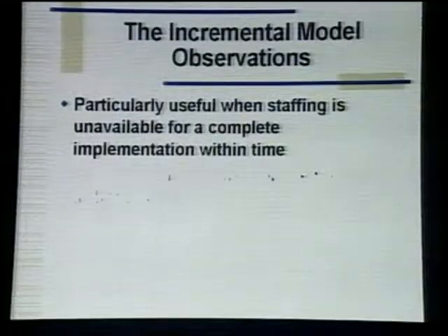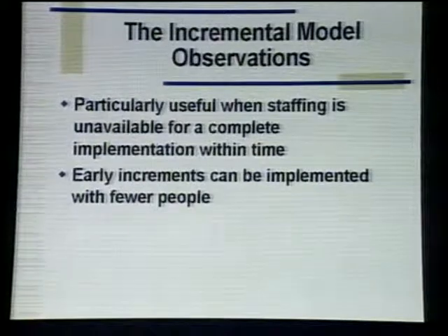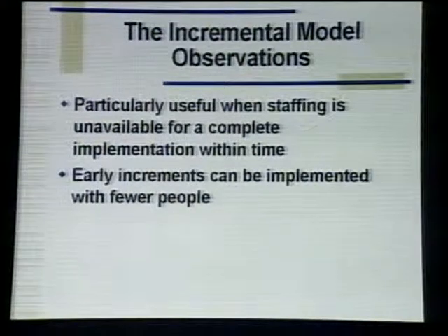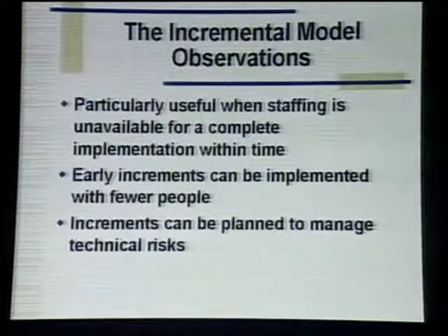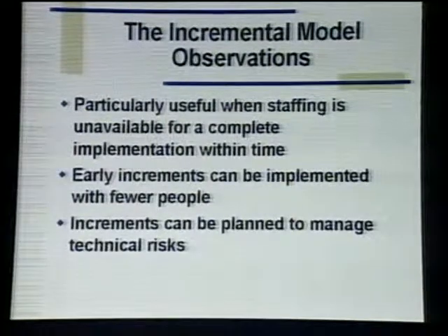And with time, they can improve upon the system with limited resources. Another observation about the model is that early increments can be implemented with fewer people, and increments can be planned to manage technical risks.